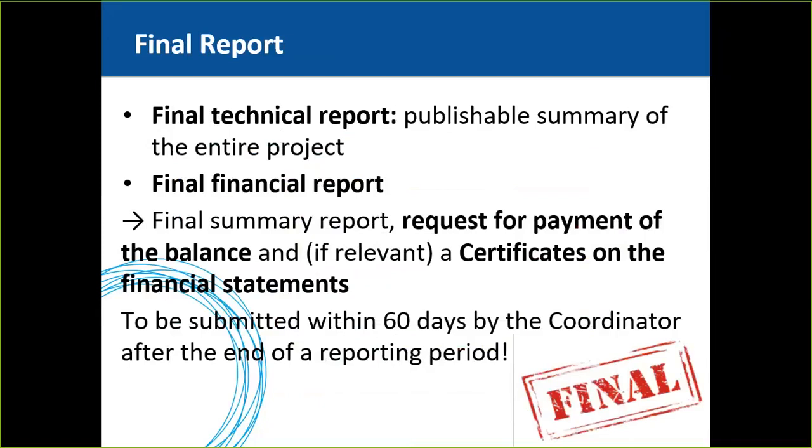The final technical report is a publishable summary of the entire project. The information that needs to be included is an overview of the results and their exploitation and dissemination, conclusions on the project, and the socio-economic impact of the project.